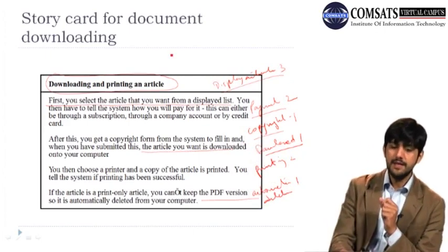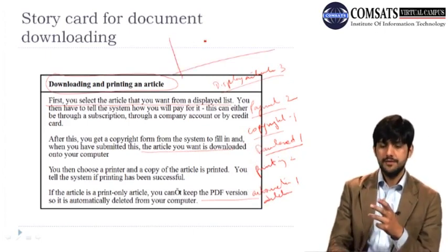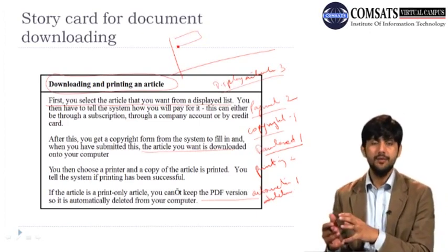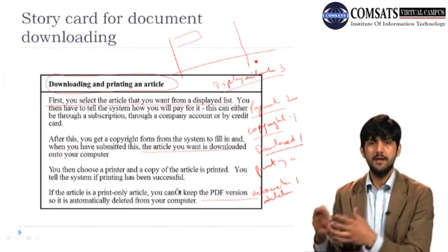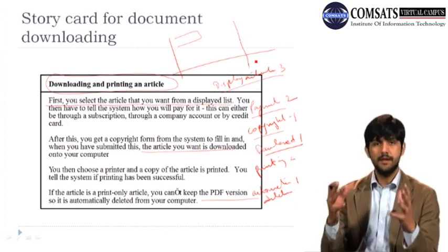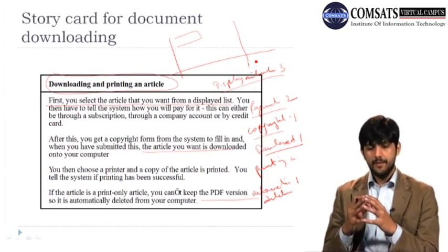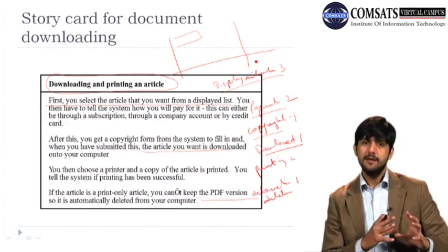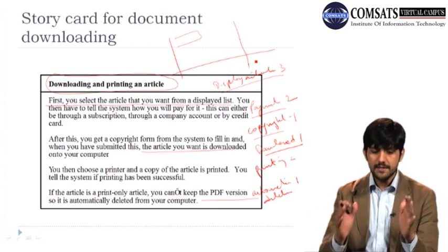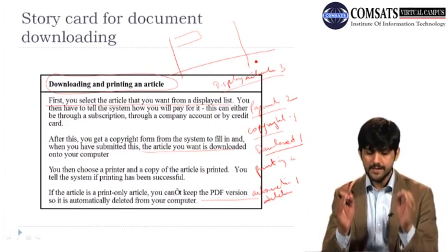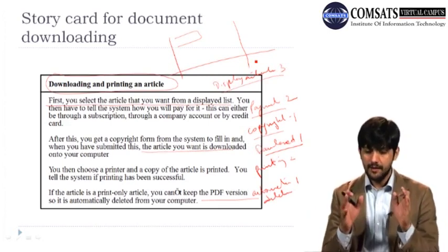So the next thing that you do is schedule it. You schedule it and see which tasks are dependent on each other, and on the basis of that you identify, okay, this iteration is going to take maybe 10 or 8 or 9 certain number of days, and you do it for all the stories, and then the client is also going to tell you which one you're going to do first.